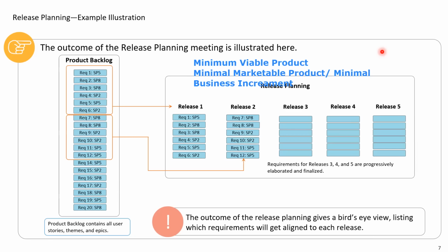Obviously. See, minimum viable product is to collect the feedback, right? And the feedback can be to persevere, to move ahead. The feedback can be, Arush, you are right, just go ahead with the extra features. A feedback can be to modify a bit, change the direction. A feedback can be to stop. So if there's a feedback to modify or change anything about your minimum version, you should incorporate it, right?